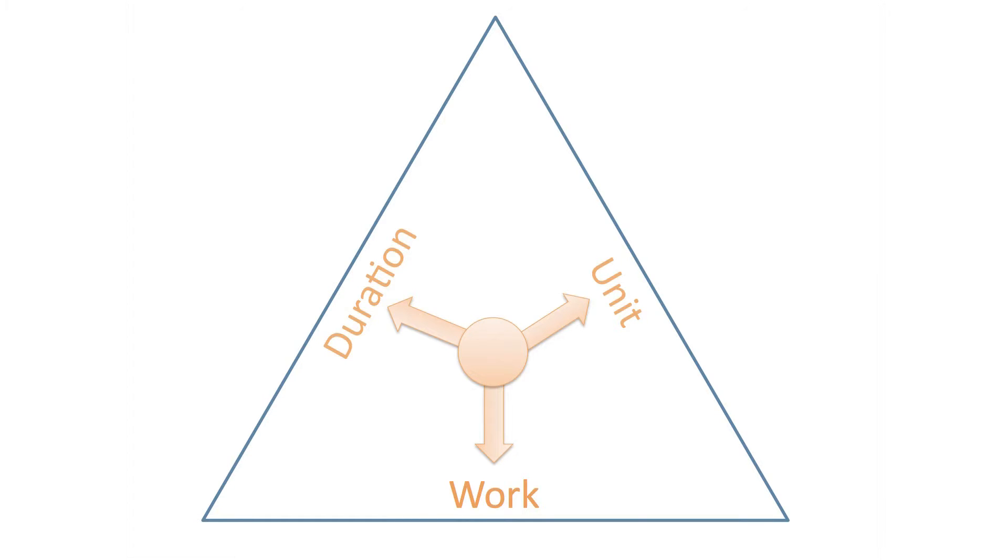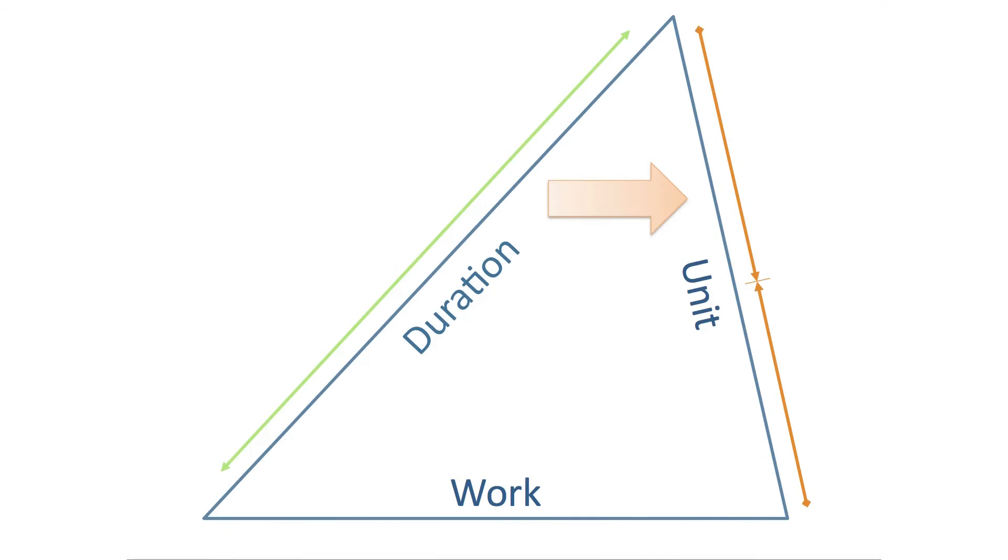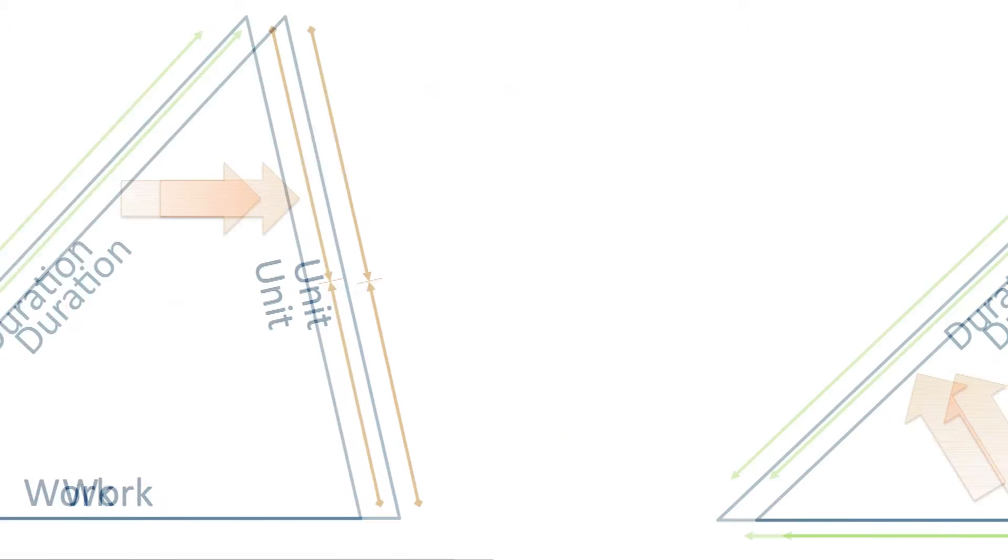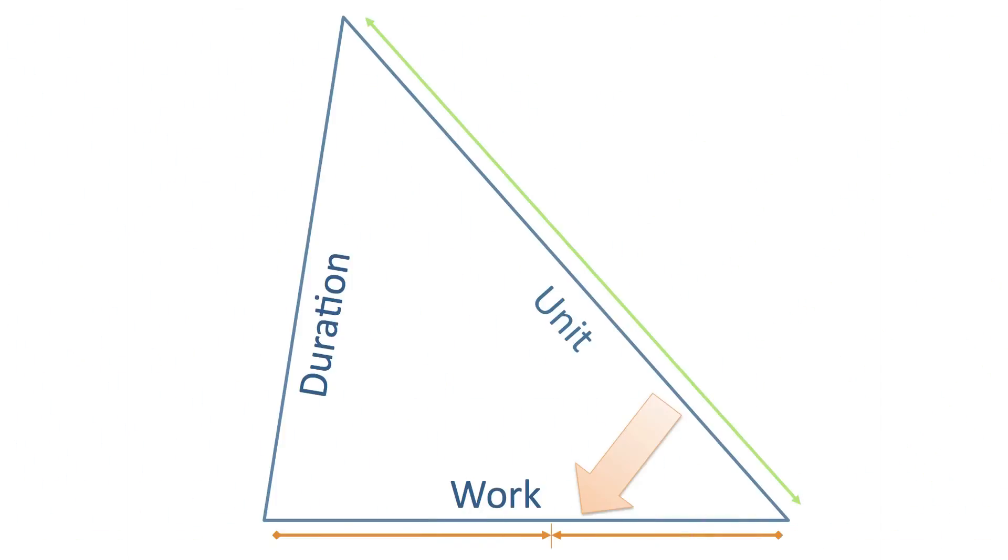For instance, increasing the duration will cause the work to increase or resource unit to decrease. Increasing the work will cause the duration or resource unit to increase. And increasing the resource unit will cause the work or duration to decrease.